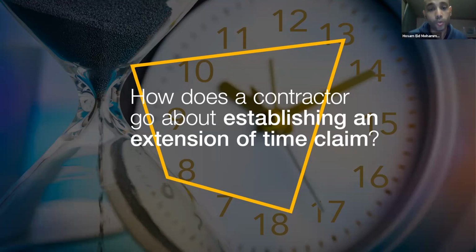And then we come to the last process, which is dealing with the schedules themselves, or if we are going to use the FIDIC term, the program. The process is quantifying delay duration, which involves calculating the impact using the available schedules, programs, and documents. There are two main methods of calculating the delay duration. The variance method, which is related to schedules, and it needs a good planner, or good forensic planner, to implement a proper way or adequate way to calculate the extension of time.